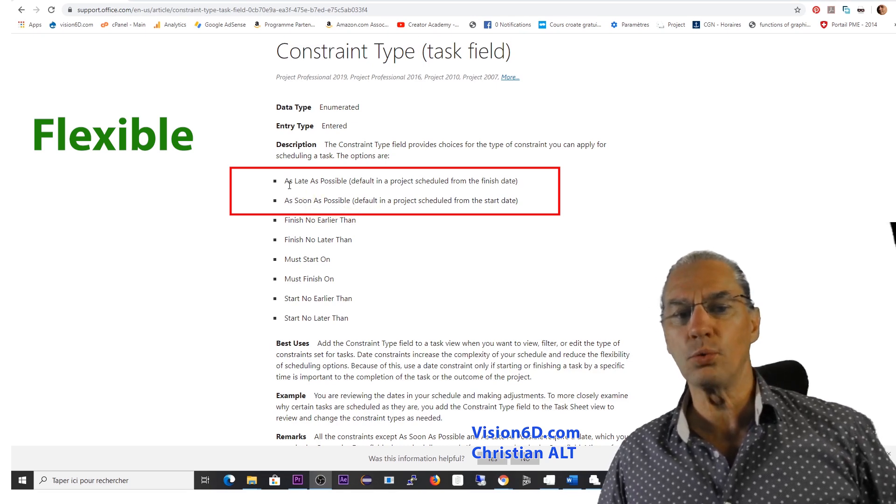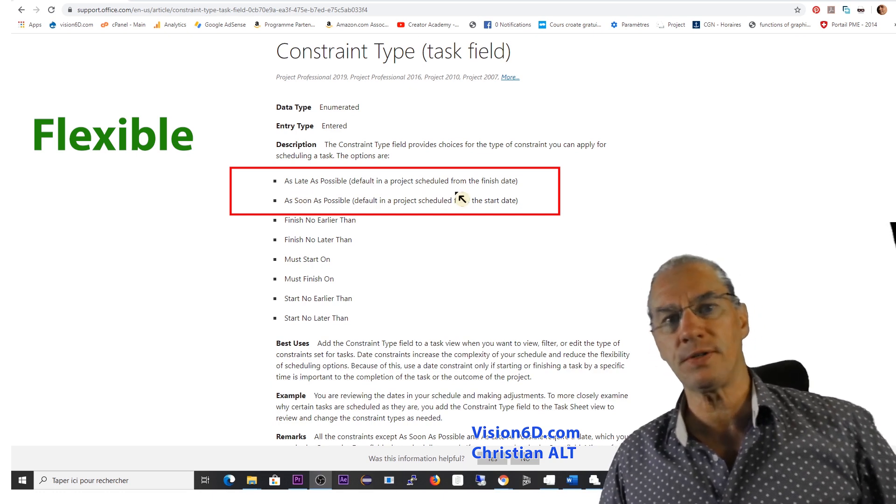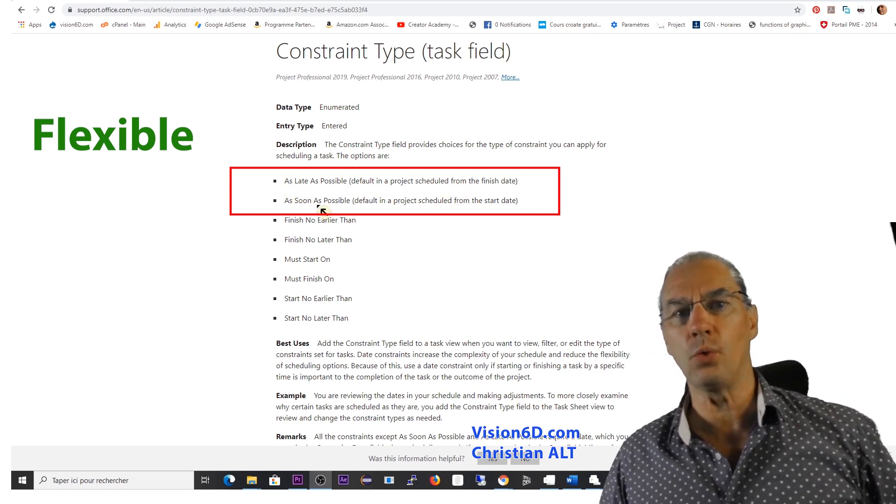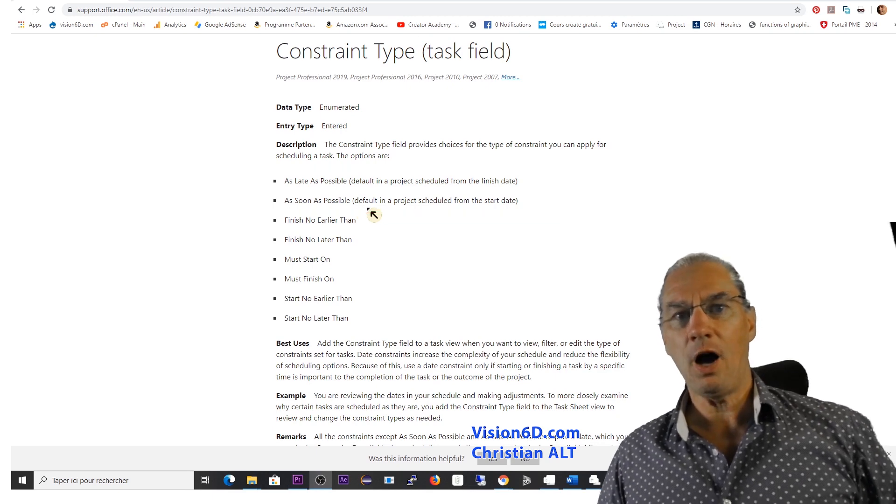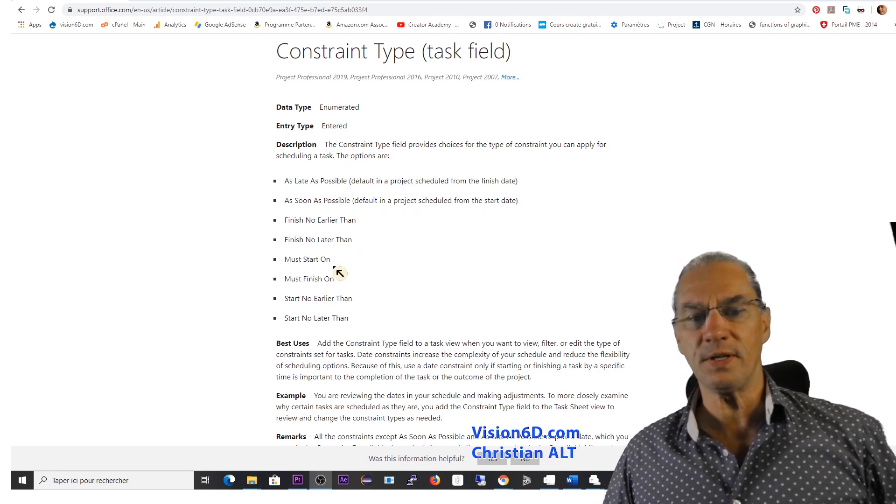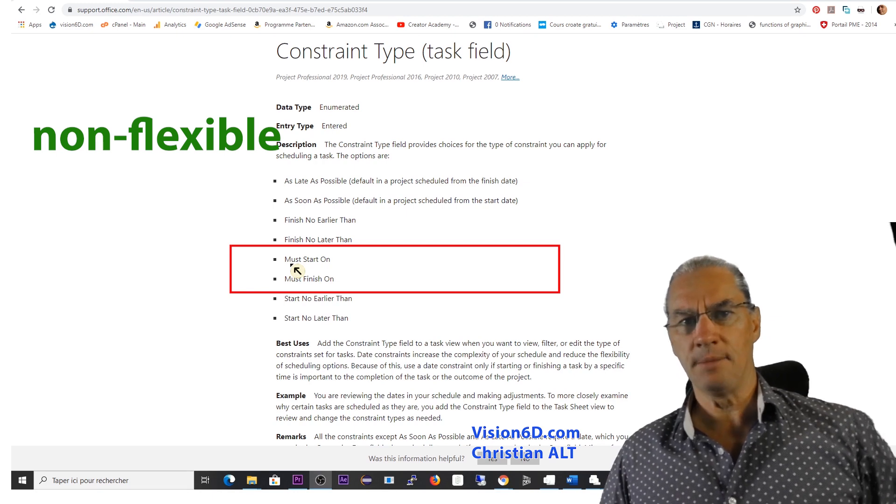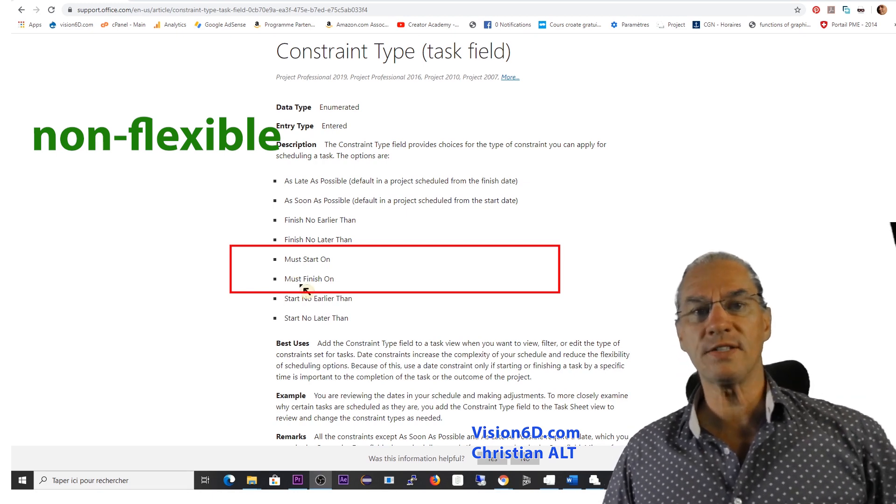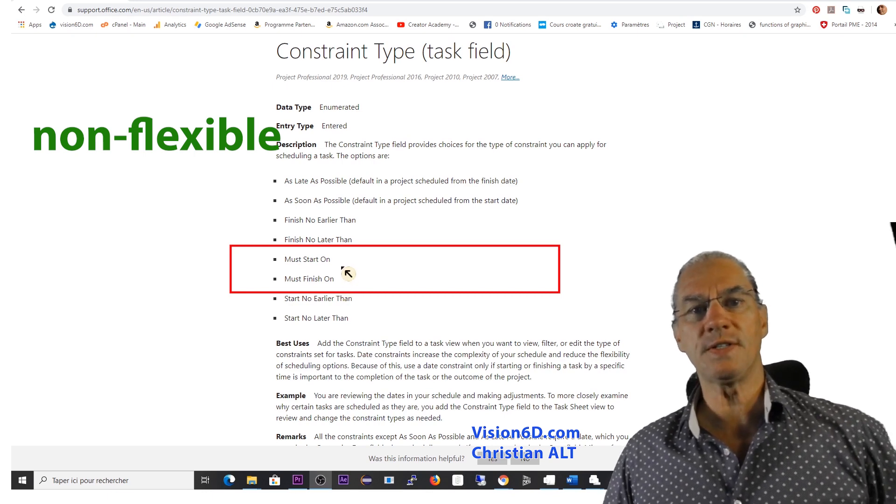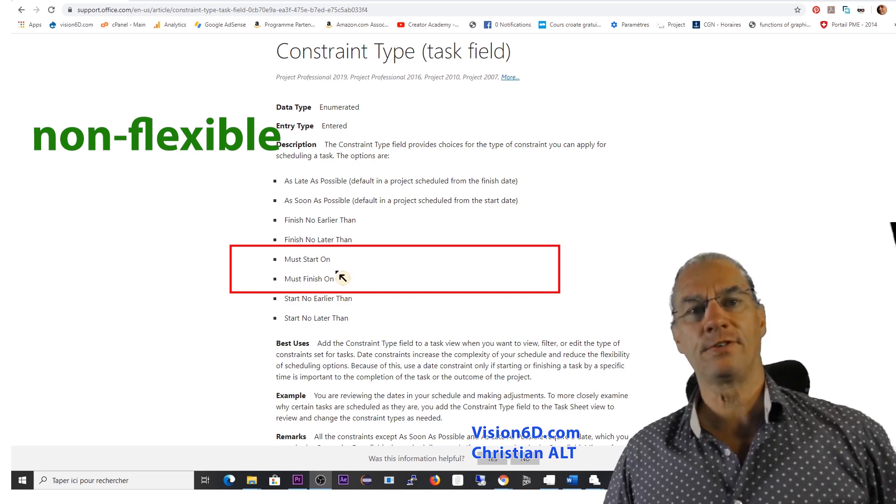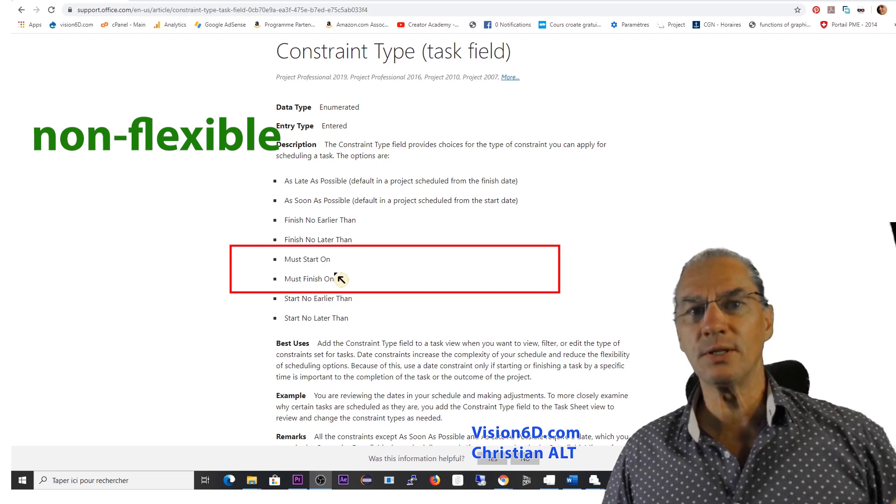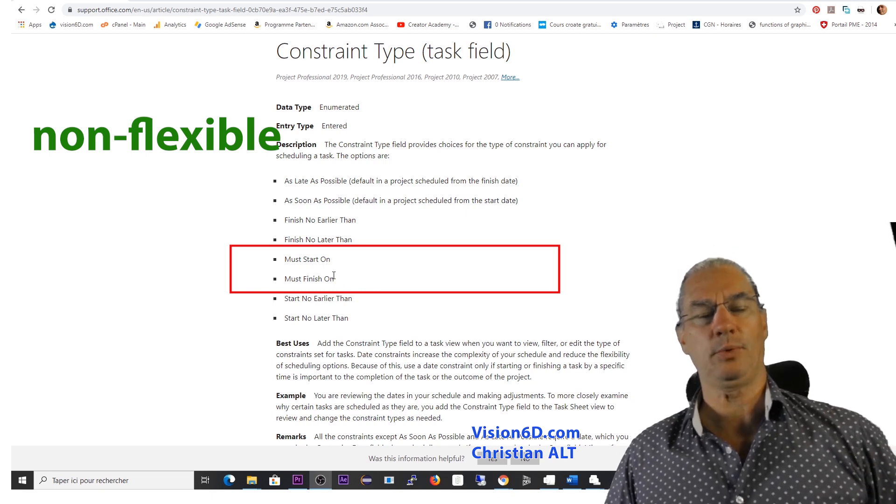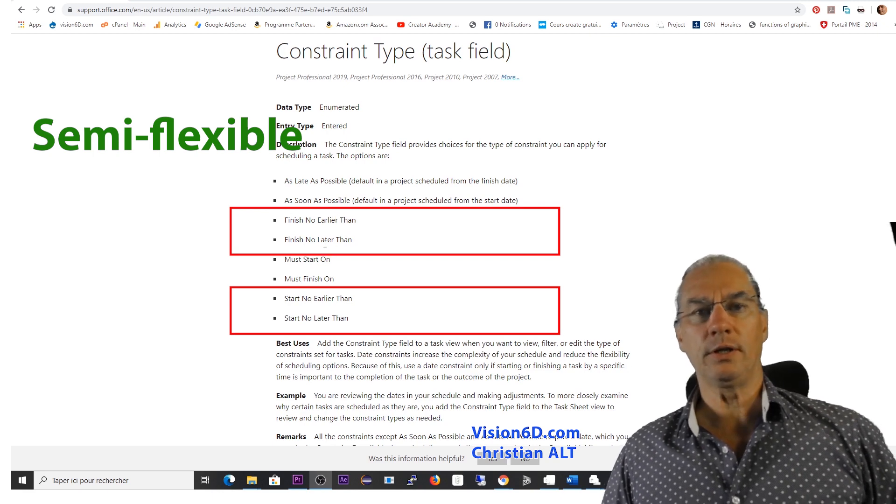As is its counterpart, as late as possible. Those are really the ones that are named flexible. On the other side, the opposite, you see here, we have constraint like must start on or must finish on. So these are really tough constraints and are absolutely not flexible.